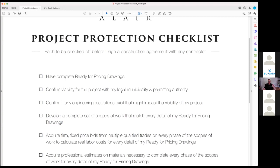As an example, if you are less than 10 feet off of your side yard property line, on the side of your duplex that you do not share with your neighbor, you are going to have to go before the BZA to do any sort of addition or modification to your property. These are critical items to think about before you go down the whole road of thinking about what kind of addition or renovation you want to do.